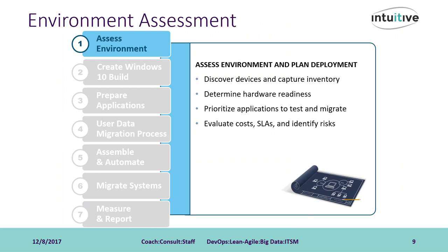be fully replaced, etc. After meeting with the business lines in your environment, build your list of applications that will need to be supported on the Windows 10 desktop. Prioritize the list, making sure to build migration and testing plans for each.